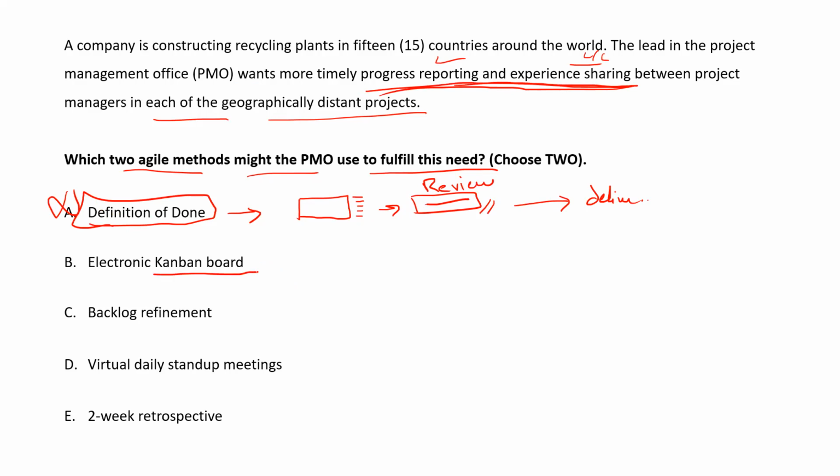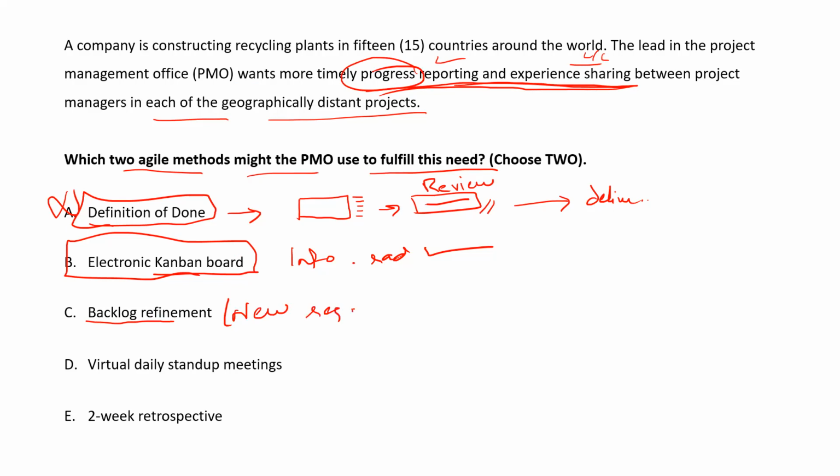Kanban board is used for reporting, right? Information radiators, yes. So this is the correct answer. Backlog refinement? They are asking for the work or progress reporting. Backlog refinement means new requirements. Is there anything in the question for new requirements? No, right? Virtual daily stand-up meetings for what? It says it can be used to discuss the learning, lessons learned, or share experience.